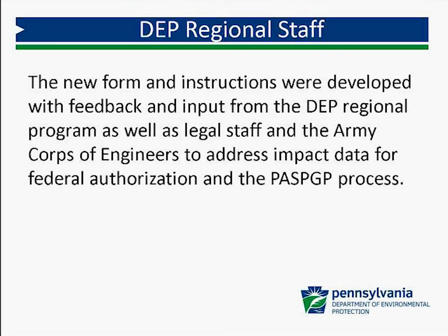So in a two-step process, you could have up to 120 days for completeness and 120 days for eligibility. With this new process, completeness and eligibility have been combined, so we're hoping that by requiring less information, better applications will be coming in, and at the maximum, an authorization should not go longer than 120 days.